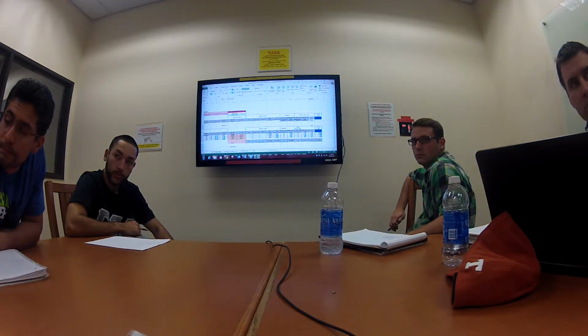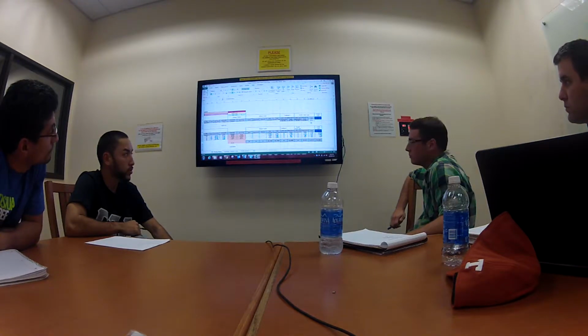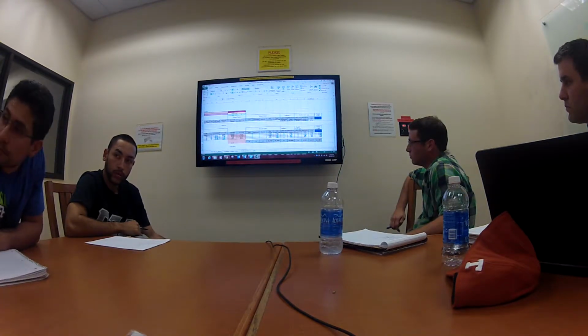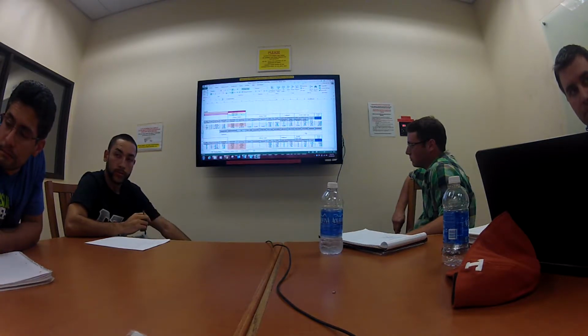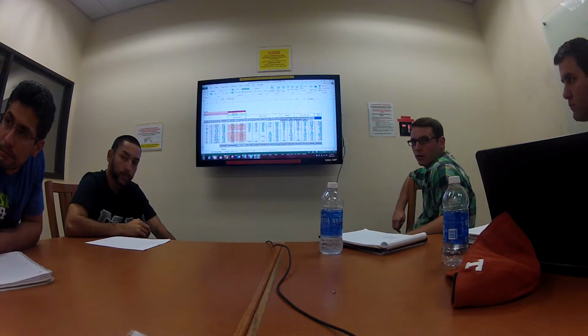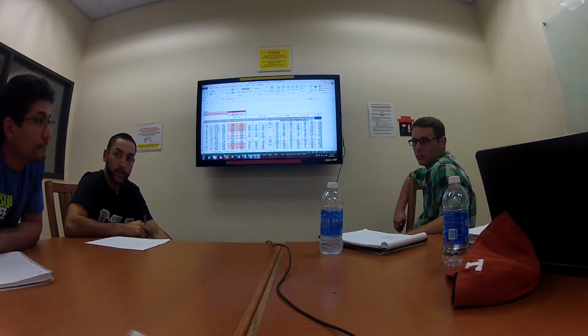That makes sense. So they're going to take the top total plus the bottom total, add those together, and whoever on bid day has the lowest one is going to get the job. They're going to decide from there if they want to actually award the additive alternate, if they have enough money left in their budget. So that's tricky, you don't want to put your indirects in that. Exactly, because if they don't pick it, then you lose all that indirect. So I had to suck all the money out of those and put them elsewhere.